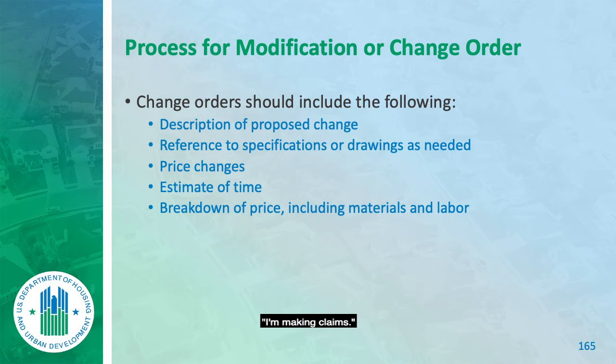He turned in a list of claims that added up to, I'm going to guess, $33,000. I had to investigate this right away. And investigating the claims, I found out that my construction administration area did several verbal change orders without documenting them. And we ascertained that those came up to, I'm going to guess, $18,000.